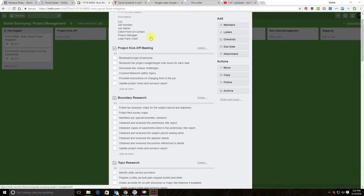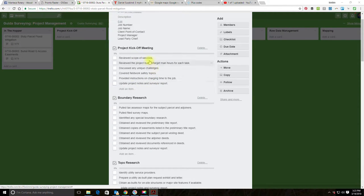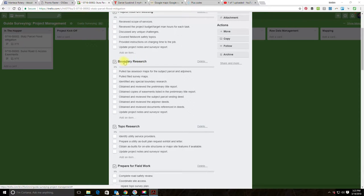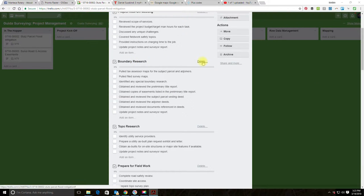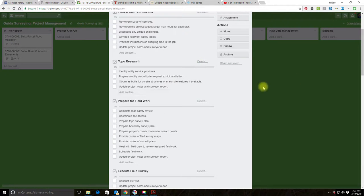Starting with the first checklist — project kickoff — we're going to leave that as-is: review the scope, review the budget and man-hours, discuss unique challenges, cover safety for field work, tell people where to charge time, and update the notes and surveyor report. That applies to most projects so we won't change it. The next checklist is for boundary research, which we don't need on this project since we're not doing a boundary survey — so we just delete that checklist.